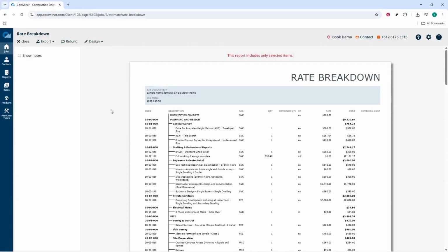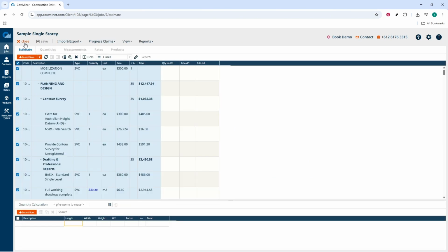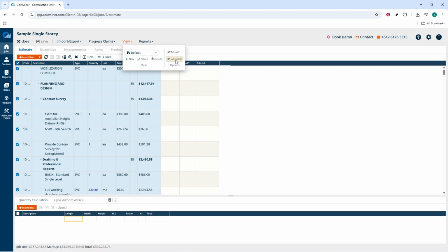Finally, enable the forecast view. Open cost control, then tracking. Switch on the forecast or projection view. Choose how you want to see time, monthly for a calendar-driven outlook, or phase-based if your project is managed around milestones. CostMiner automatically uses your baseline estimate as the starting curve, so you'll immediately see how costs are expected to flow over time or across phases.